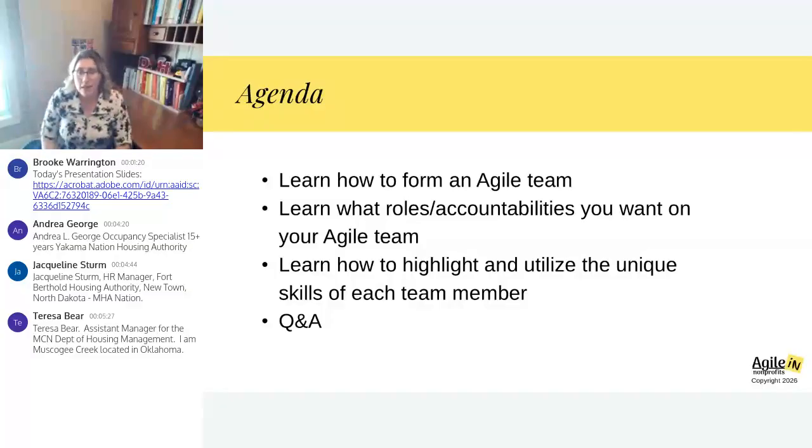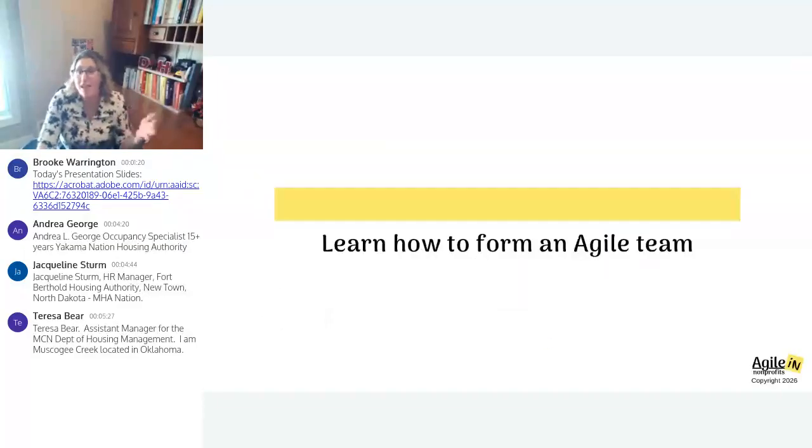Why are we going to talk about just one thing? Because if we change more than one thing about the way that we are working at the same time, if we change two things, if we change four things, if we change seven things about the way we're working together as a team, we won't know which thing had the positive impact, or maybe the neutral impact, or maybe a negative impact, an unexpected negative impact. We just won't know because we changed too many things.